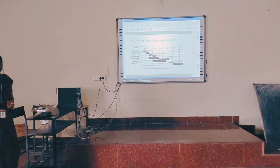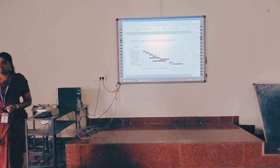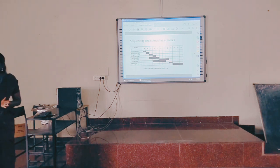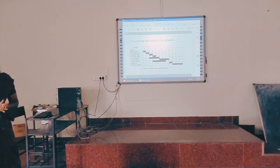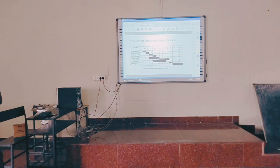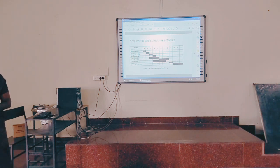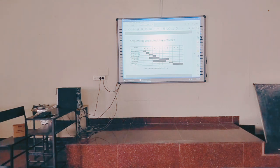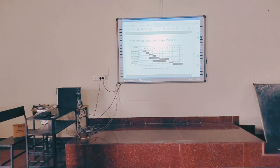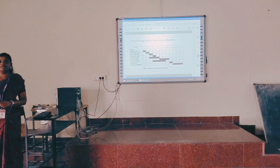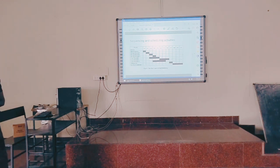The next step is sequencing and scheduling activities. Now we have decided what activities are to be performed for every module. We have to order the activities — in which sequence, in which order the activities have to be performed — because some activities will be dependent on other activities. After sequencing, scheduling is when you have to start the activities and when you have to complete them. A schedule has to be prepared for each and every activity.